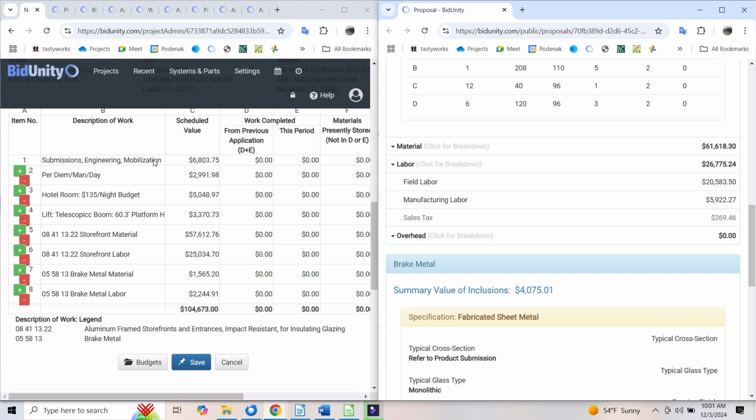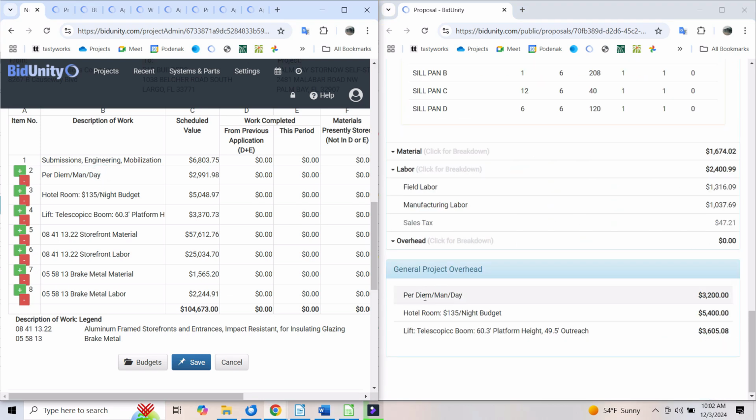We're always going to be billing this first line item. When we review and sign the contract and send our shop drawings, we're sending it with the first invoice, which is going to, at a minimum, include this line item, and that helps with cash flow. But we have, from our proposal, we included certain indirect expenses. Those show up here. This schedule of values, when the page loads, it's being rendered from a template.